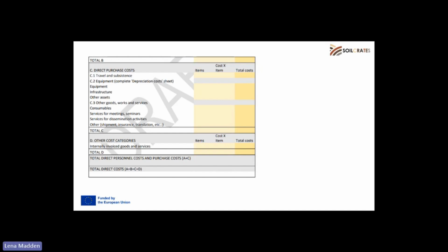So you can only claim 2 years that the project is going to be working out of 6 if you're applying for any type of equipment. Equipment you can hire as well, and if hired, you can claim that cost in full.